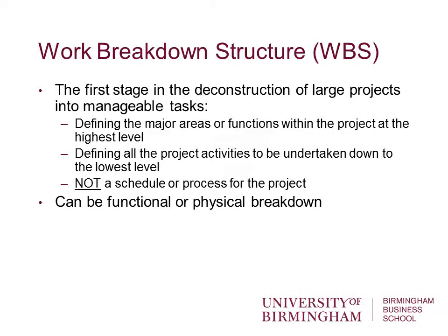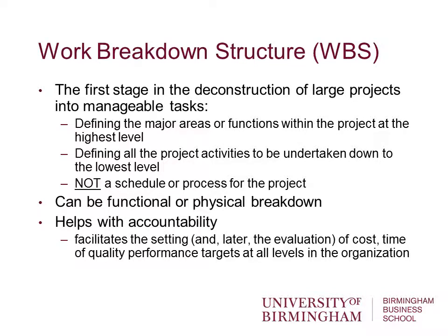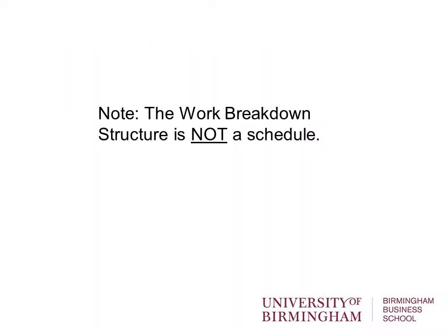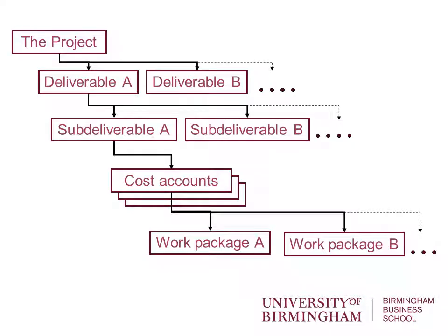It can be functional or physical in terms of breakdown. It can also help with accountability. Who's responsible for each task? What's the cost, time and quality performance targets at all levels of the project organisation? And we use a coding system. So I remind you, the work breakdown structure is not a schedule. And this is the sort of thing you would do.